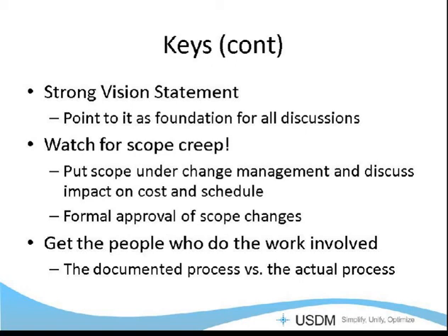And to that point, watch for the scope creep. You better put your scope under change management, and anytime you're going to modify it, you should do an analysis on the cost and the schedule. These implementations can just really explode in effort. And make sure you have formal approval of scope changes.